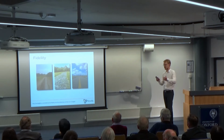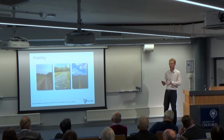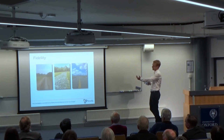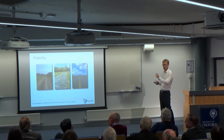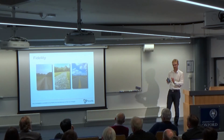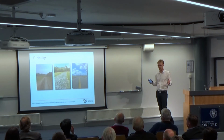So if you have this task of going from A to B, and you say, well, we don't have the time to build the motorway, you might be tempted to say, well, we can't do that feature, but maybe we can. You just have to make it smaller, right? So the idea is that the fidelity has increased there. The dirt road on the left is a low fidelity solution to your problem. On the right, this is a high fidelity solution. So you can thin your scope, right? It's cheaper to build, takes less time, etc. But you still have the whole scope.